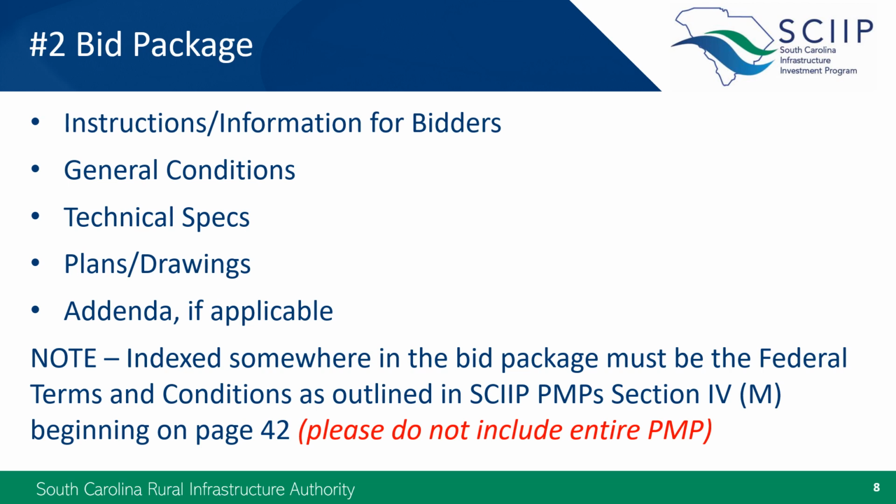And we have required that the federal terms and conditions must be included in the contract documents. Unfortunately, we are still seeing bid packages submitted where this information was not included. It is our strongest recommendation that you identify those terms and conditions in your table of contents and include the contents somewhere in the bid package.